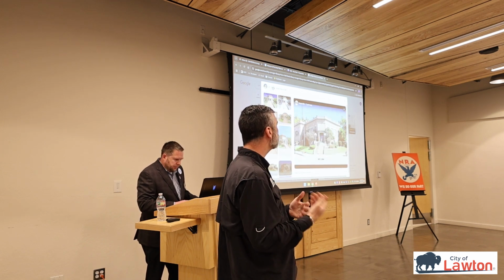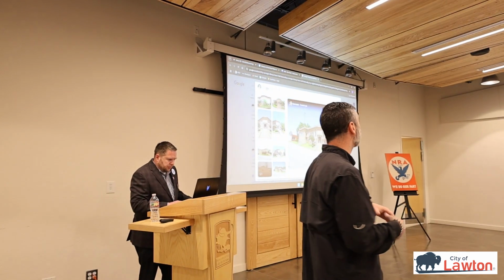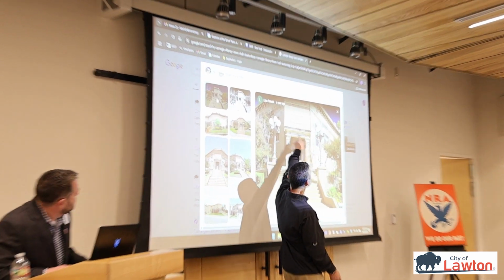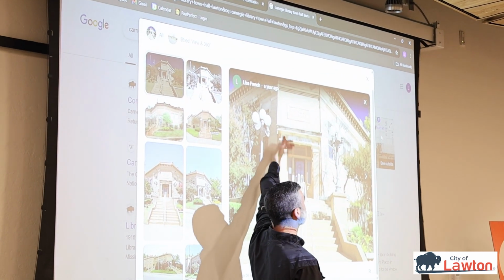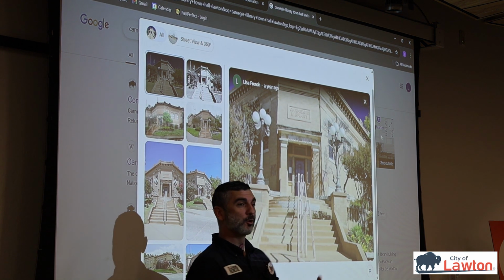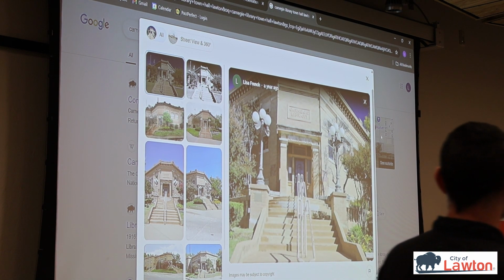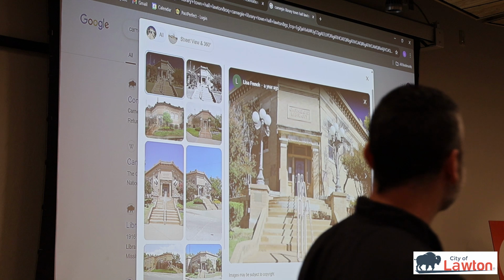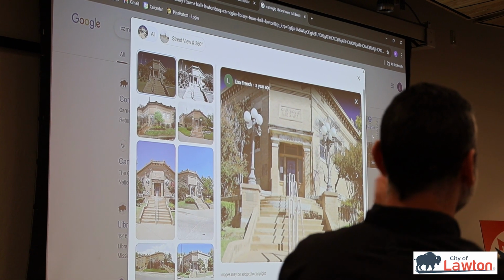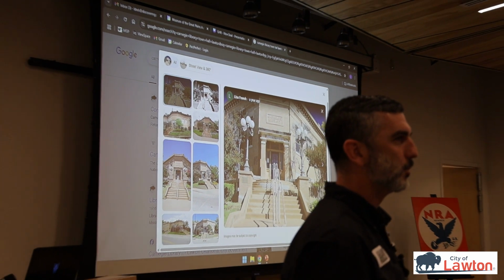And so this is one of those questions of why do we have damage? Is it just the steps problem? And it actually isn't just the steps problem, but it's the portico over the door. The mortar's missing, it's leaking through. The cheek walls that go around either side, mortar's missing, water's going through, absorbing into the concrete itself, causing that oxide jacking that's happening, and then probably some overwatering of plants. So yes, we can replace just the concrete steps going up, but unless those things are done too, then we're going to end up with the same problem.